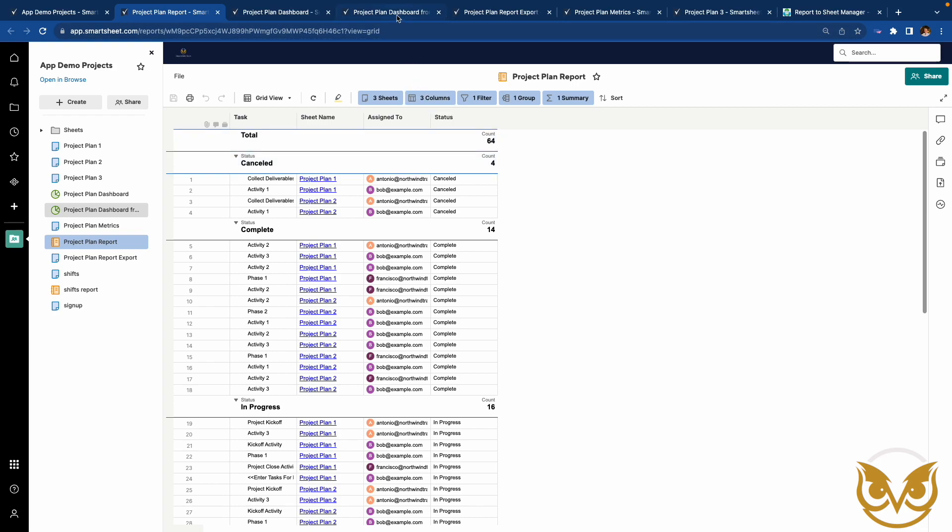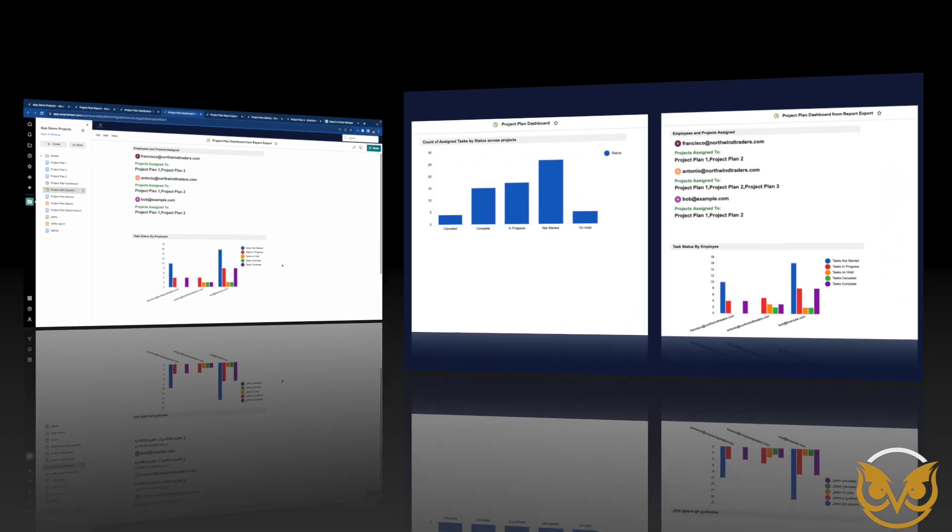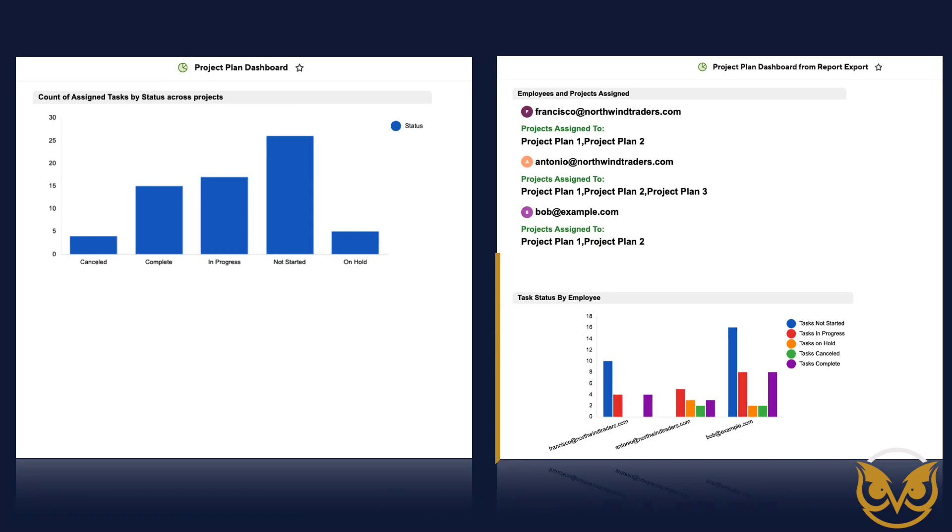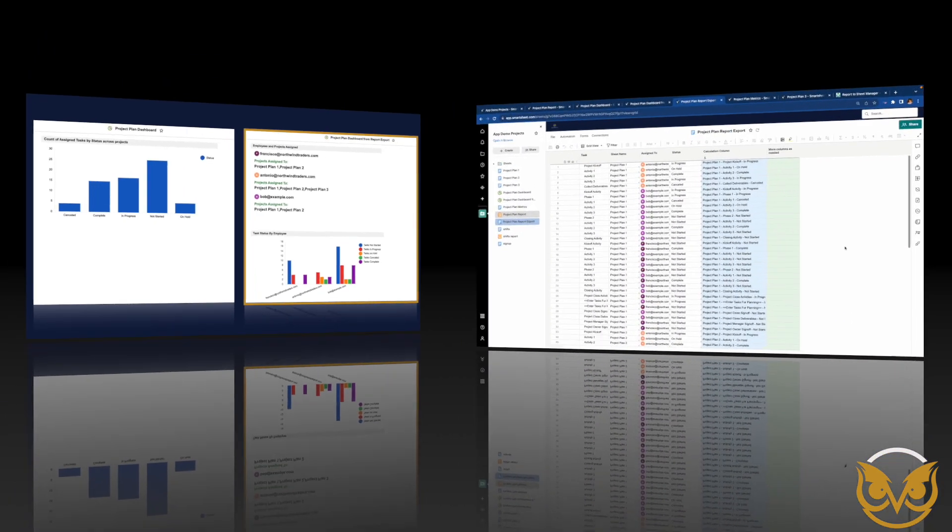Now let's take a look at another dashboard. It has a metric widget showing an employee and which projects they are assigned to. In addition, there's a chart showing how many tasks each employee has in a given status across the portfolio of projects. Both of these dashboards are using data from the report. It's just that the second dashboard has taken the report data from a sheet.